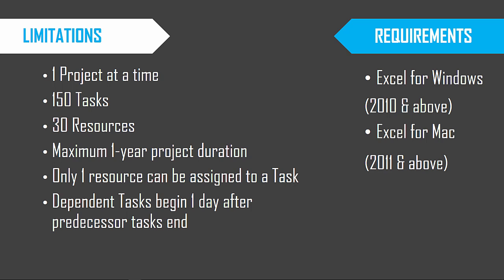In order to accomplish all that we have seen so far using a very simple Excel workbook with no macros, we had to create some boundaries. The template can handle only one project at a time, though we can make a copy of the file and manage a second project separately. A project can have up to 150 tasks and 30 resources. The maximum duration of a project is one year. The scheduling engine can handle only one resource assignment per task, though the template can handle two predecessors per task, scheduling dependent tasks to begin only the day after the predecessor tasks end.